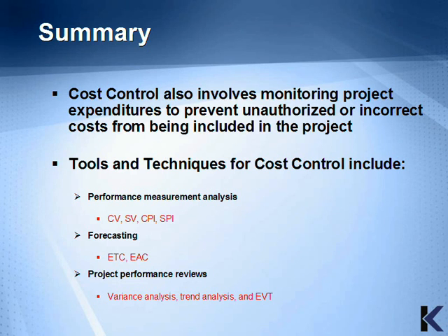Tools and techniques for cost control include performance measurement analysis, which is your cost variance, your schedule variance, your cost performance index, and your schedule performance index. It includes forecasting, which is the estimate to complete and the estimate at completion, and the project performance reviews, which are the variance analysis, trend analysis, and earned value techniques.